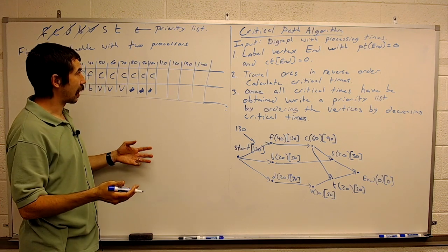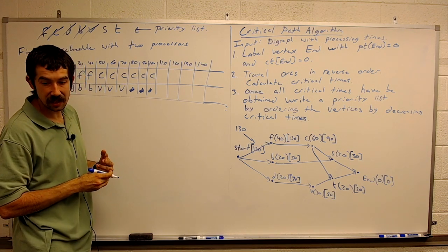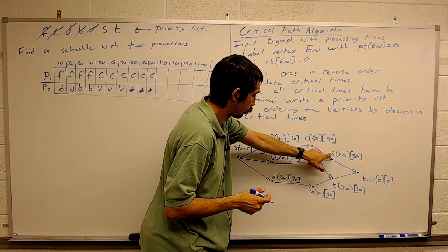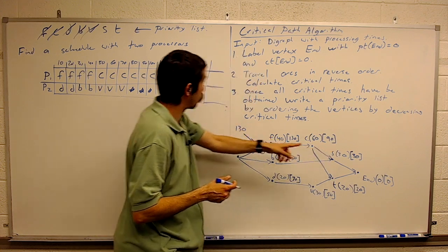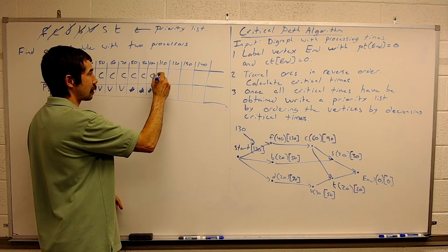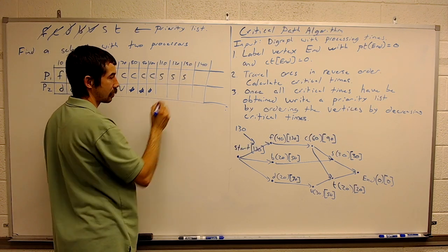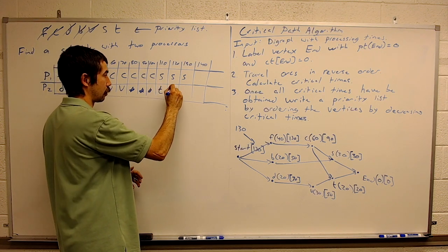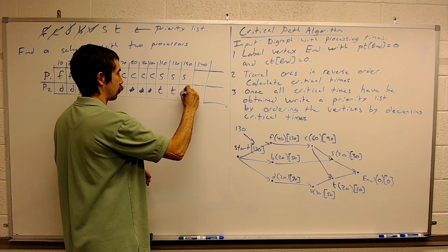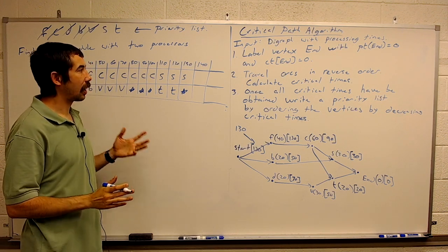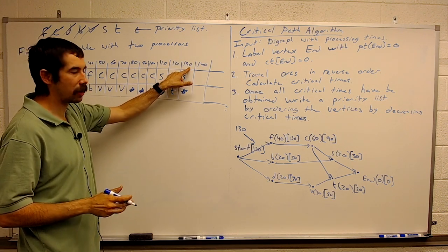And we are ready to hand out the next tasks. All right? What's first on our priority list is S. So processor 1 will get S for 30 minutes, and processor 2 will get T for 20 minutes. All right, and now all the tasks are complete. And it took us 130 minutes.